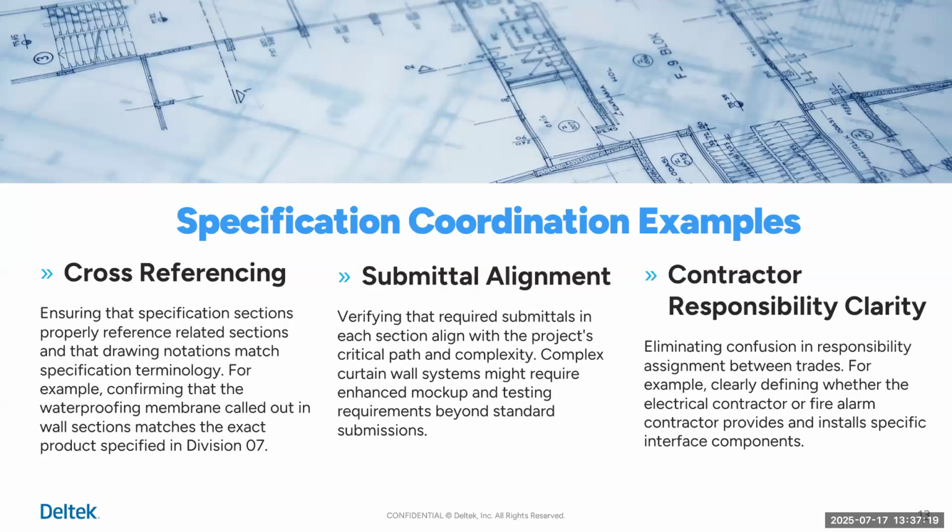because I've had my share in my career of "See specs" that I didn't know about because no one told me, or it was some last minute information put on the drawings that did not reach me. People think that the drawings and specs are all produced in parallel. That's not the case in reality. The drawings will always be ahead of the specs, and sometimes it's hard for the specs to keep up.